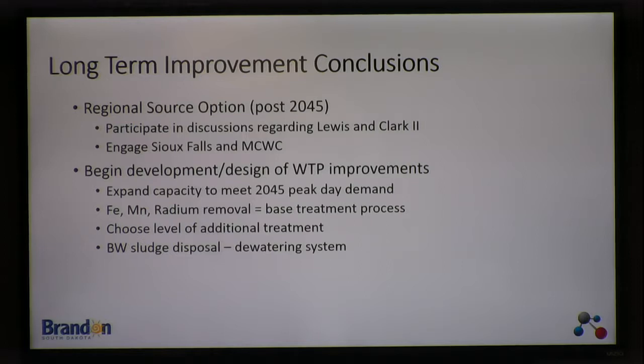So within this framework of understanding the availability of water, that would be really the next phase, is to engage that process. But included with that would be the other considerations. Some of these other things need to happen relative to discussions with Sioux Falls, relative to waste disposal, discussions with DENR on additional possibilities for RO disposal, to understand where that all needs to go. A discussion with DENR about the anticipated additional requirements from Split Rock Creek.